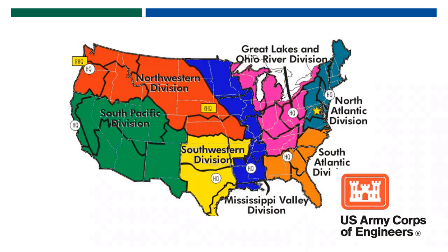So late design changes at FFPR, if they are within ESAs, environmentally sensitive areas such as wetlands or streams, which are 404 waters, if those changes affect those resources, we may have to reapply. And that is too late for us in GDOT to make our on-time environmental certification. If we're reapplying at or after FFPR, we've basically missed the LET certification, and we risk either a late certification or a conditional certification. So these are not desirable circumstances.